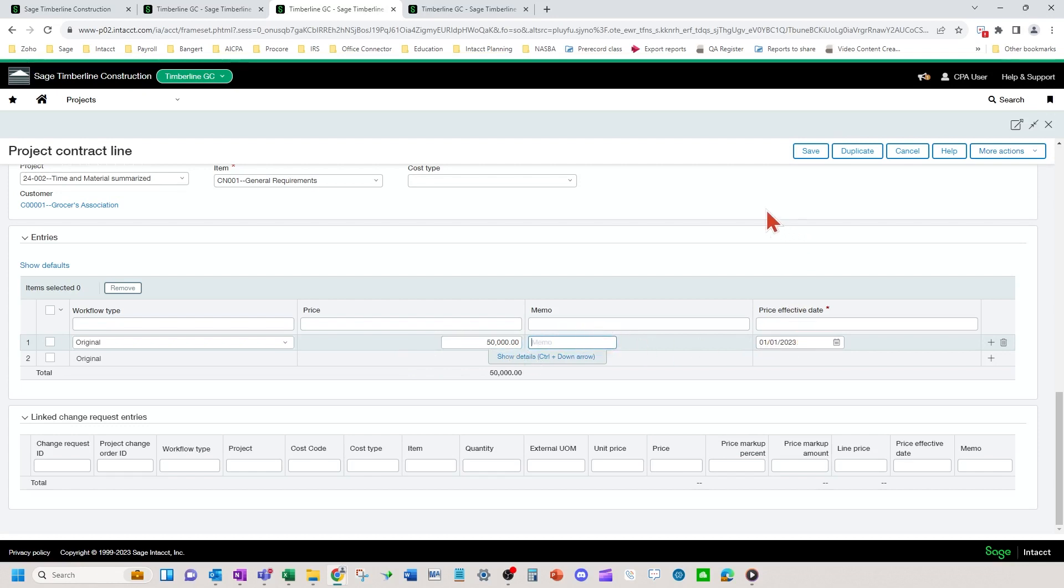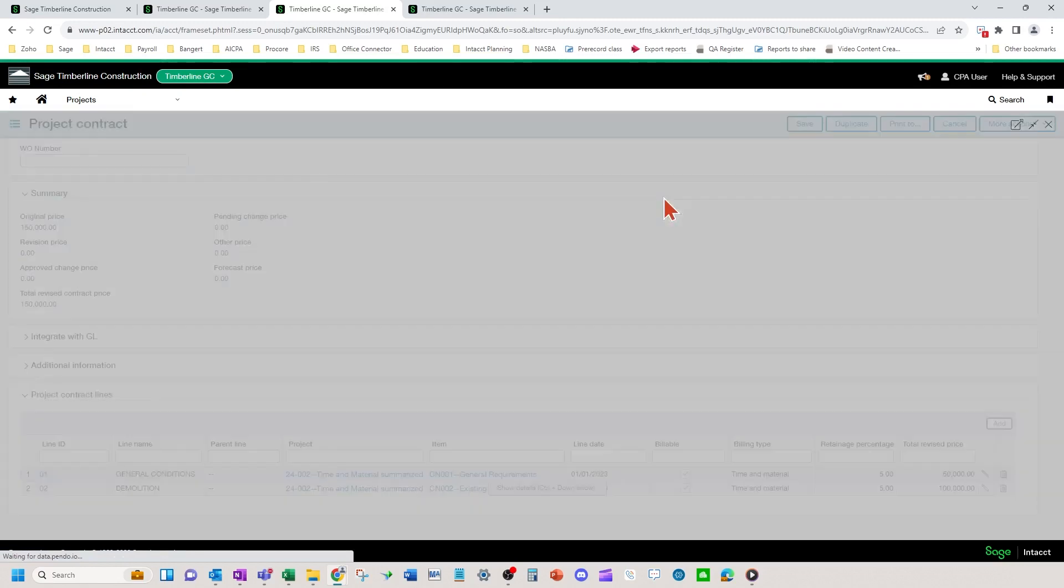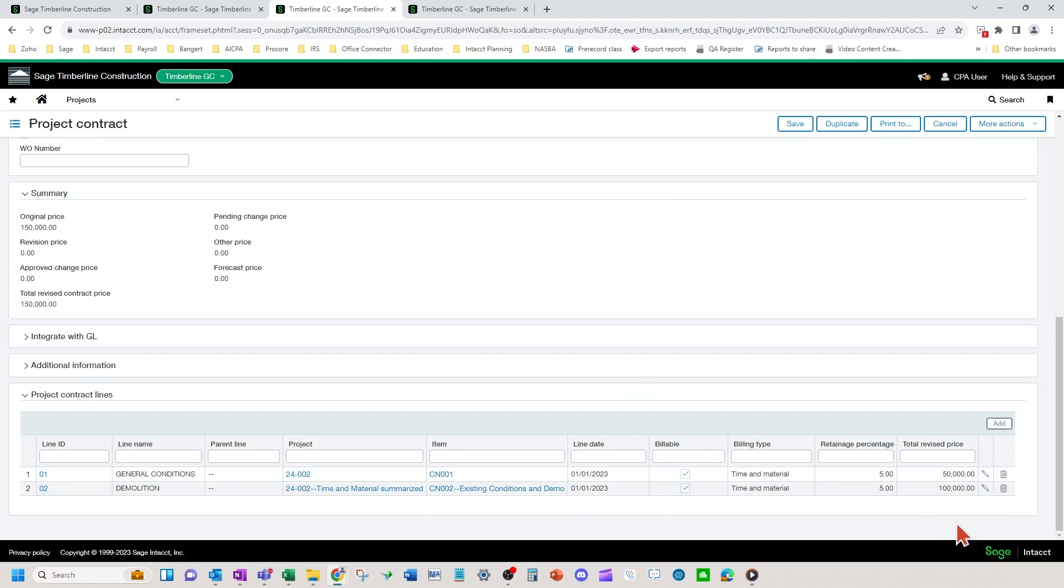And if you want a schedule of values amount on the general conditions, you'd put 50 grand here. Then you have another line as well. You'd have all your schedule values lines similar to that line I was showing.